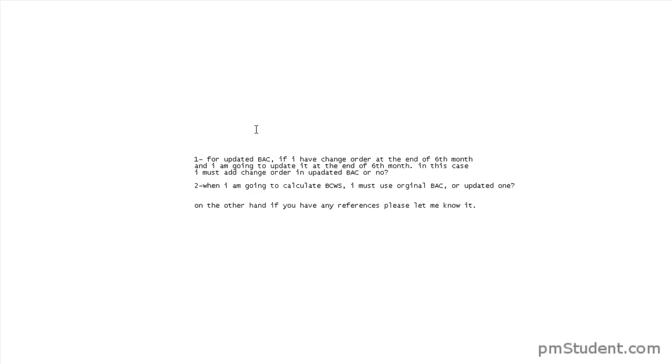So in that situation, you are going to use an updated BAC. It's going to reflect both the work that you've already done, and you're going to do this new budget at complete based on what your scope is now after this change request is approved and has gone through.